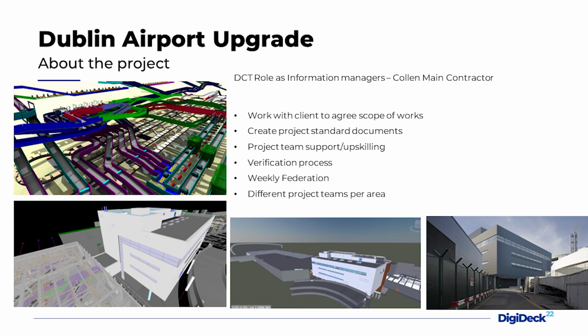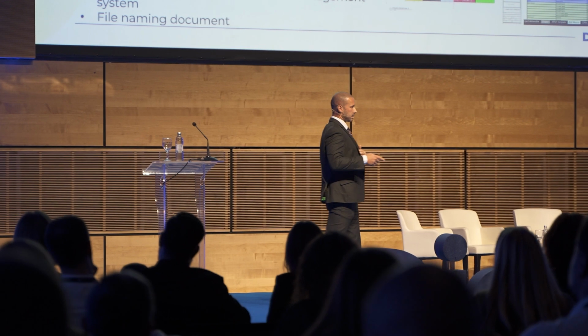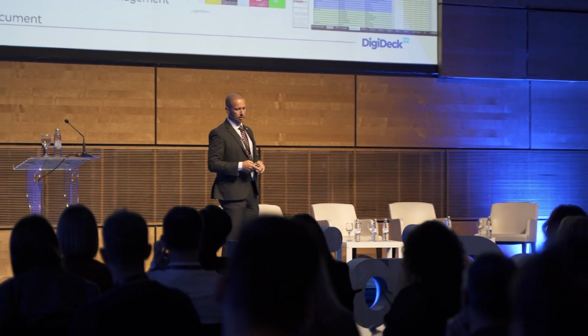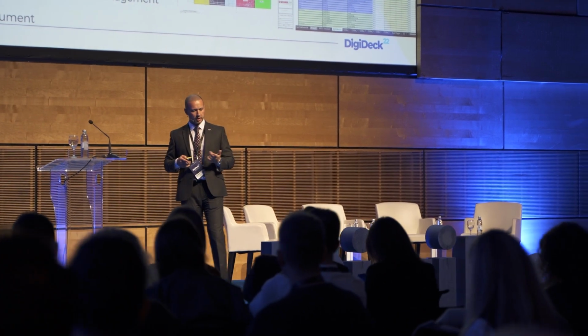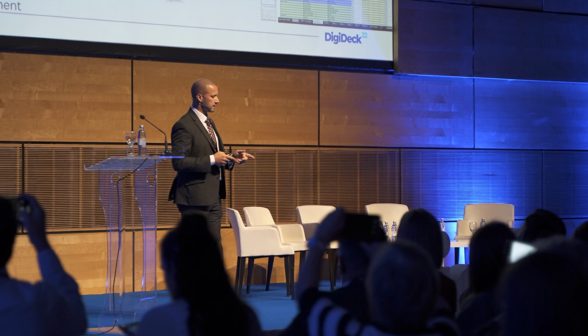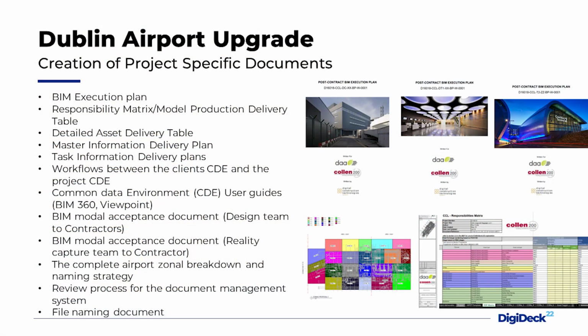So we do the standards, weekly process and weekly federation, weekly meetings and so on. And I suppose we had to manage it, and this list on your left, if you're looking at the screen, these are all the list of the documents that we had to create for each area, but also with approval from the client and the different client representative. So we had the BIM execution plan, the responsibility matrix, the master information delivery plan, the task information delivery plan.